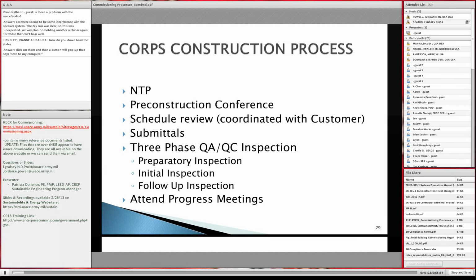The inspector will go out to ensure that it's actually what was specified and that it wasn't substituted without our knowledge, and things like making sure that you have a Trane HVAC instead of a half HVAC system, because you want to make sure that the set points meet the design. And the follow-up inspections would be every day, going out to the field and seeing what they're working on today and what quality they have, what their safety is.